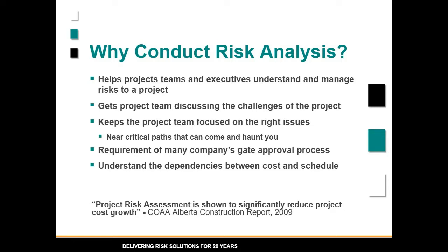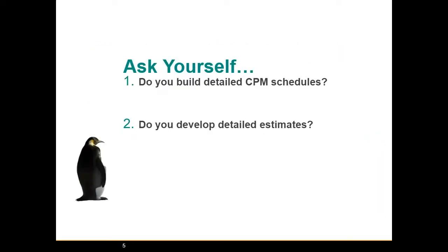Now, I'm located in Alberta, and there's a group here called the Construction Owners Association of Alberta. And that group puts out reports every couple of years around mega projects in my part of the world. One of their findings consistently has been that project risk assessment significantly reduces project cost and schedule growth. And they identified that as early as 2009. So people know we should be doing it, but why should we be doing it?